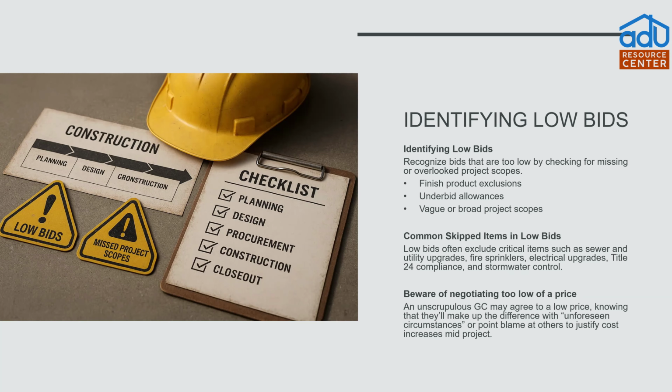So, not trying to scare you, but be careful what you ask for because you could get it and it could be your worst nightmare. If you're getting bids and you're looking at the lowest one on the bid, they either missed something or they deliberately are buying the bid, and you're going to be going through this process. And we've had customers call us and say, "Hey, I gave my contractor X amount of dollars and I haven't seen him in 3 years. What can I do?" That's a tough one. I don't know what to say to that.